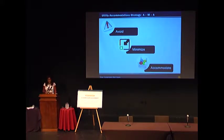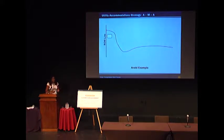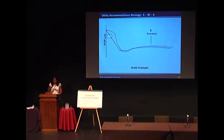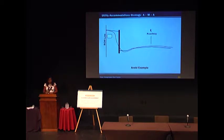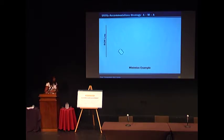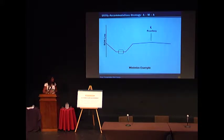So in the real world, what does that look like? Here we have a utility facility that's in conflict with the proposed roadway ditch grade. We can coordinate with the designers early on in the project development process to try and design around it. One example: redesign and include a retaining wall to remove that conflict with the proposed ditch grade. If that scenario is not possible, then we want to try and minimize impacts. In this instance, they can't put a retaining wall, so they'll redesign and minimize the impact by covering the impacted facility with a concrete cap.